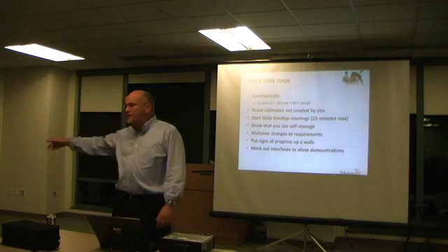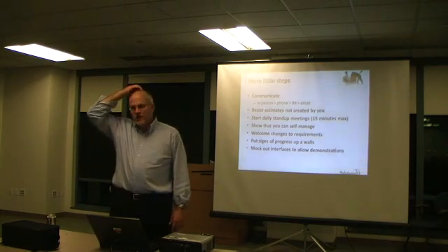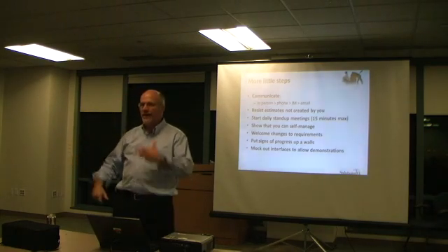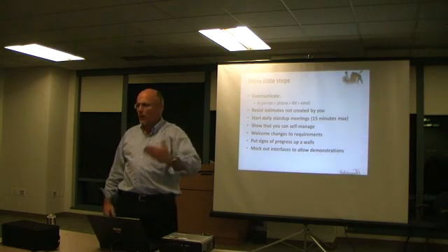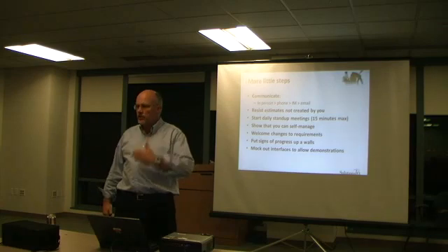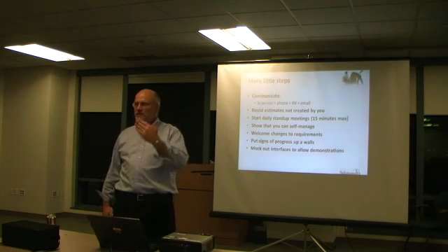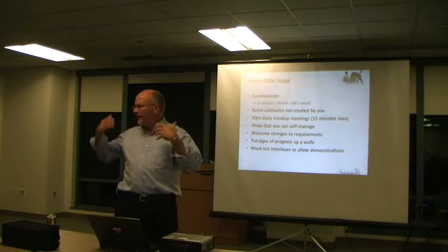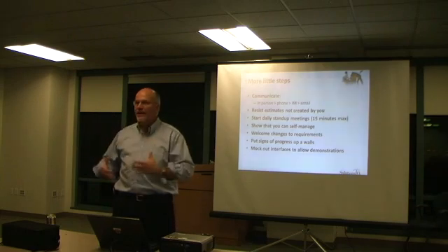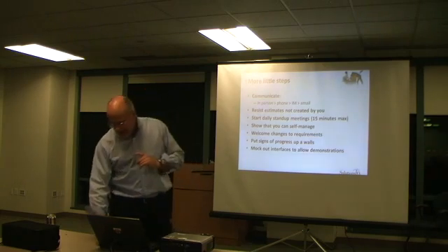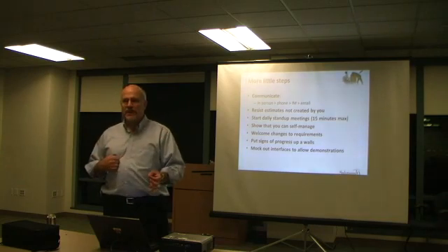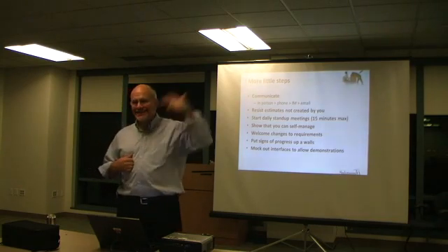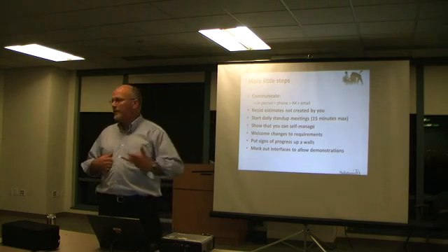Mock out interfaces. I continually hear people say, well, I can't demonstrate this, or I can't finish this because I'm waiting on him to get this piece done. Well, mock it out. Make some progress, make some assumptions, have a data contract, have a database contract. Mock it out so that you can make progress. It's less than optimal, but I've even demoed with mock stuff while you're waiting on these other guys to get stuff done. But it's better than not mocking it out at all.